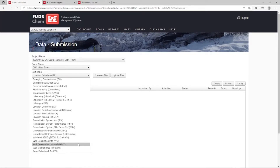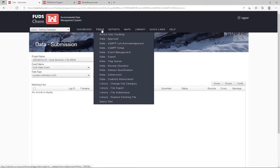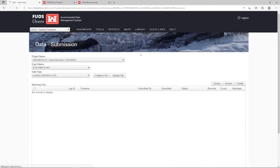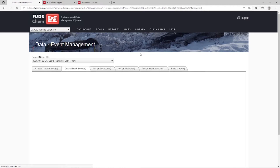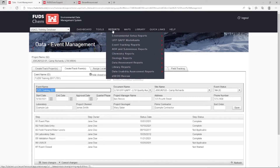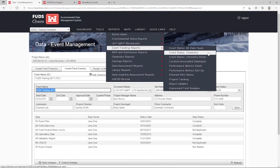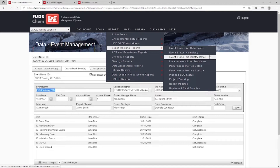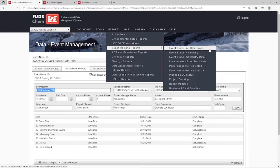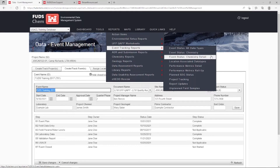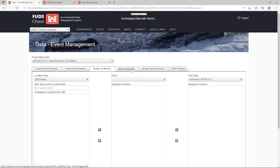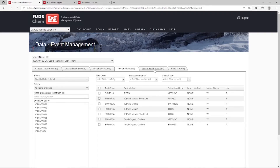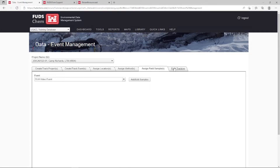30 days prior to sampling, we recommend using the event management tools in FUDSCHEM to plan your event. Note that your project may require a different timeline. The event planning tool helps manage large datasets by allowing the user to create event tracking reports. These reports update in real time and use color coding to indicate the status of each planned sample, tracking the event to ensure samples don't slip through the cracks. Both chemistry and non-chemistry data can be planned and tracked, and it is recommended to plan all applicable data types. Refer to our Event Management tutorial and our Event Tracking Reports overview for more information.